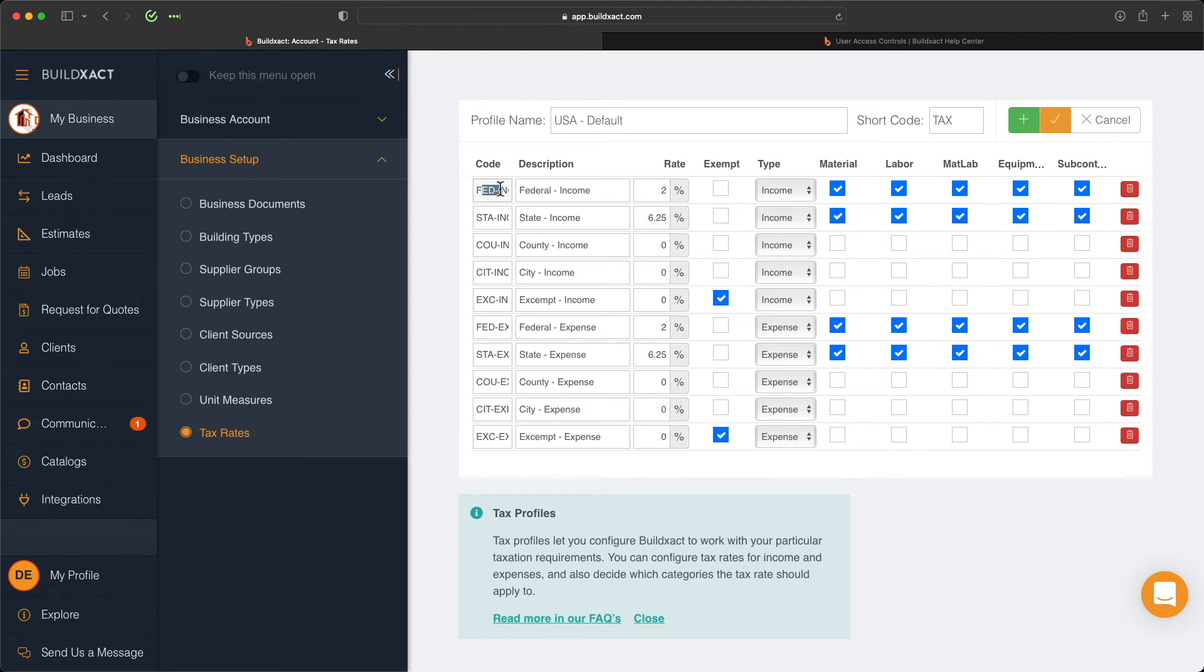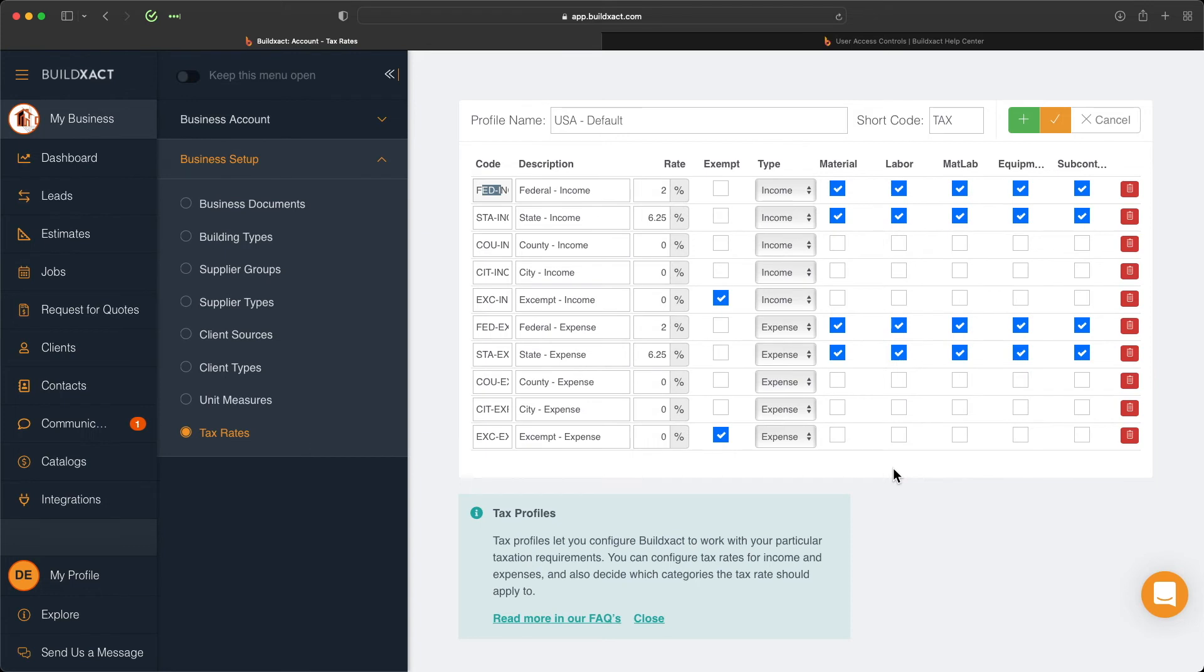The other recommendation here is for the exempt line. We have one for income and one for expenses. Basically, what we're saying here is that as you're going through, let's say you're doing a change order for a client and there's an item that on purpose doesn't have any tax, so it's a tax-free item. You can select this line to make sure it doesn't have a tax applied to it, so it's not defaulted to any type of item. When you tell us it's tax-free, it just reverts to either of these, so you absolutely need this in there.